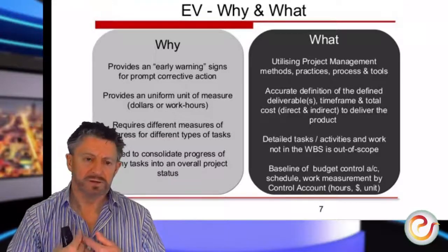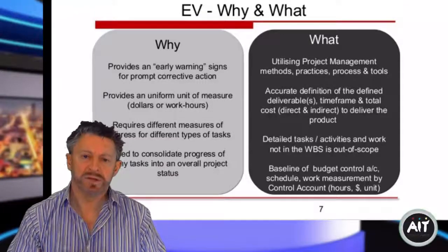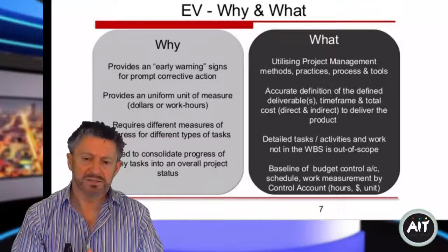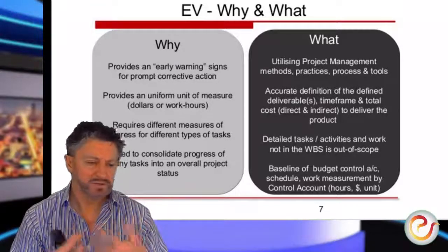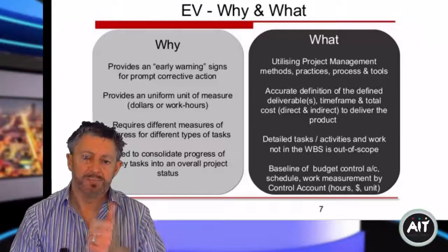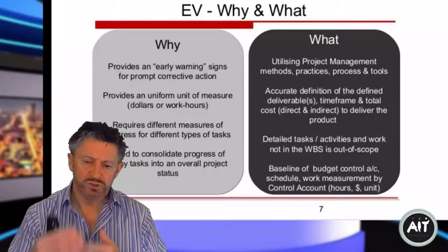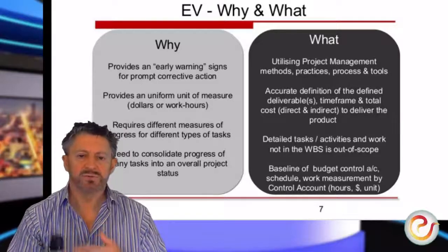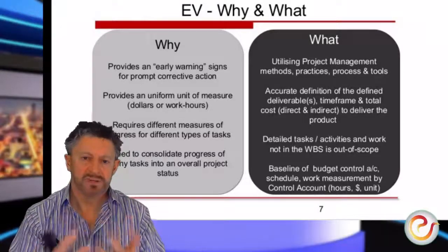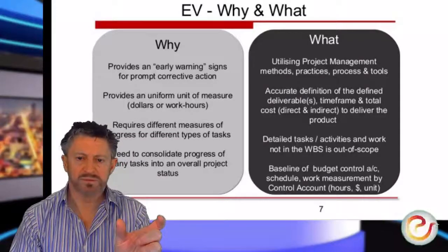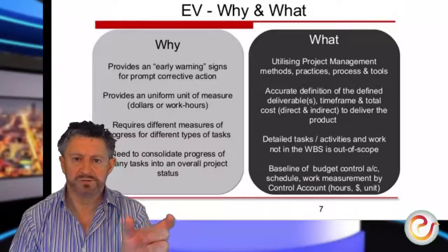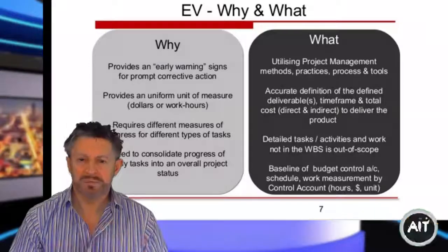And same for my time, how many people and how much are you paying them, what's their salary, and this is the cost. So the total salary, including the company's contribution of taxes and so on, gives you a man hour cost. But usually in small tech projects, we combine the two of these and say it takes a man and a piece of equipment to produce this piece of deliverable. Combine these, it makes life a little bit easier.